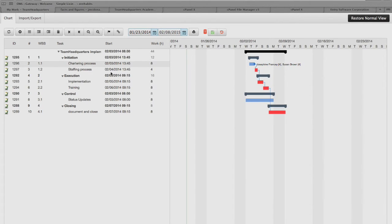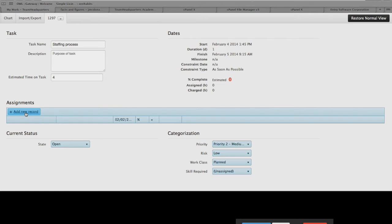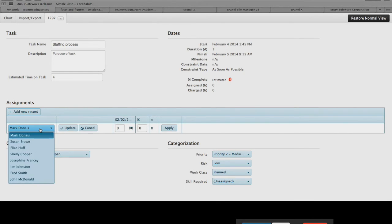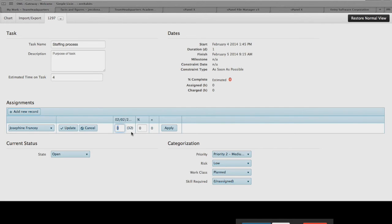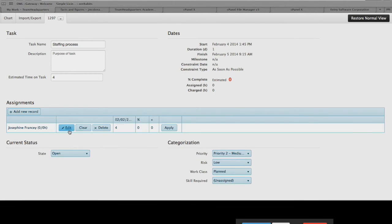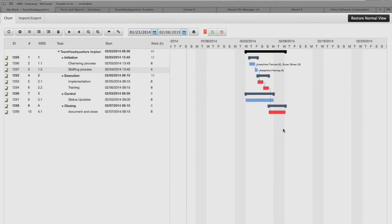We can see right away that we've got people associated with that task, and as we go through, we can also see their names in the text area of the Gantt as well. Let's go down to the staffing process — this one is going to be done just by Josephine, since she's the project manager. We can see out of Josephine's 40 hours, she has 32 hours available. We're going to put four hours in here, update it, and save those changes. Now we see Josephine is on this task for four hours. We just continue to do that as we go through the project and save it.